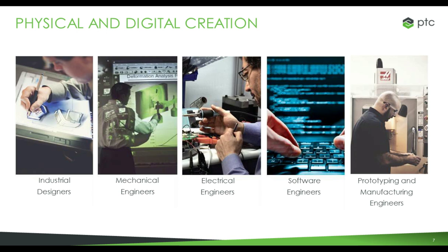Traditionally, if you're outsourcing components of it, there's typically a budget for what is scoped within that component. But if you're taking an entire project to a design firm, they can work with you through flexibility in budgeting, so that in some cases you might save money in an area where you come under budget in mechanical or industrial design work, but you might find that savings can add more components into your electrical engineering design, so you